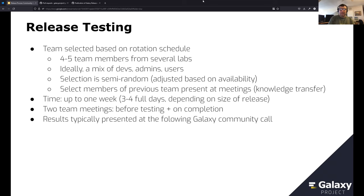Testing usually takes about a week — three to four full days depending on release size. There are two team meetings: one before the testing period and one on completion. Results are typically presented at the following Galaxy community call, or if that's missed, a formal report is provided.